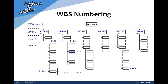Looking at this skeleton, let's understand how WBS numbering is done according to its different levels. Here we have a comparatively bigger structure with a maximum of 5 levels. WBS level 1 is dedicated to the project title, which holds the summary of all further levels. Level 2 is numbered as 1.1, 1.2, 1.3, and so on. When it goes into the third level, numbering is denoted by three numbers such as 1.2.5, meaning the fifth branch of 1.2, and 1.2 means the second branch of the project. This structure also indicates that it is not necessary that all work packages are on the same level — work packages can appear at level 3, level 4, and level 5.